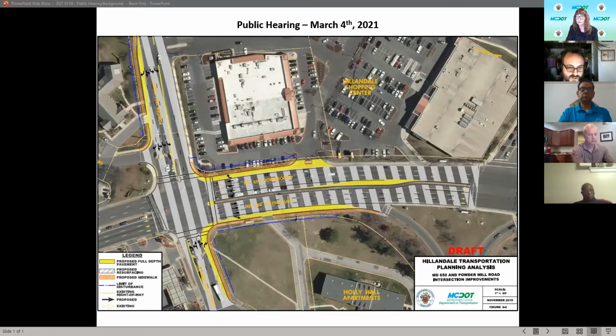So the costs that are listed in the cost estimate, that was just used as part of trying to get this information together. I can take a closer look at what has been dedicated and see if that affects the cost estimate. We'll also see if it may make sense that the cost estimate really is zero. Presume that, we'll see if it gets built as part of future redevelopment or if it be its own project, and how right-of-way might, whether it should or should not be a cost in the estimate. That'll be weighed as part of the hearing.